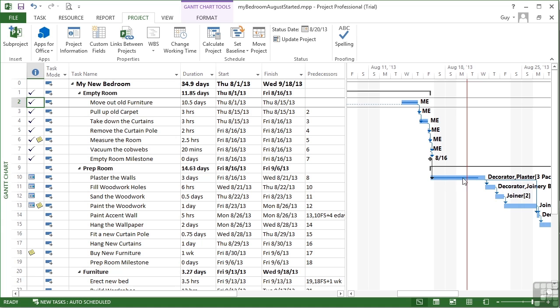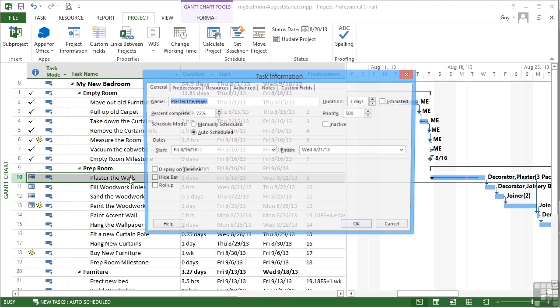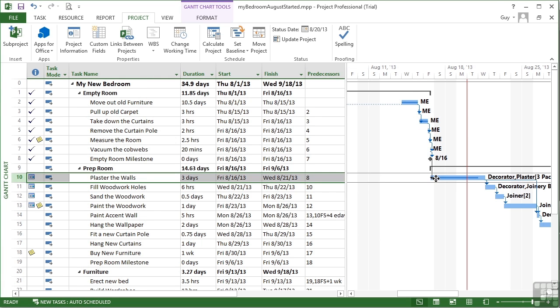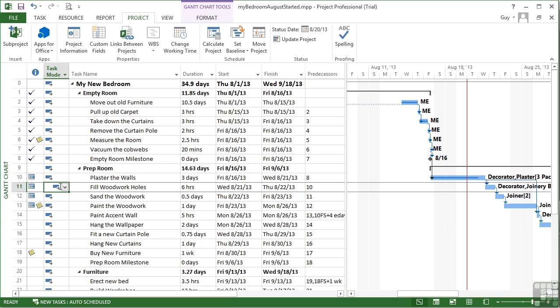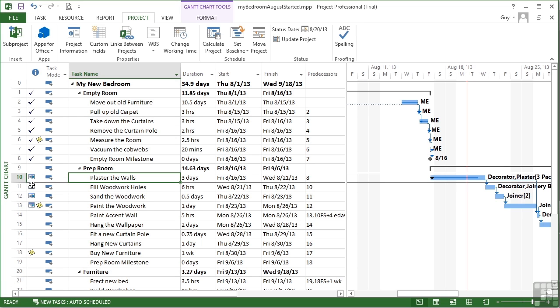Those that cross over the date, such as this task here, plaster the walls, it will have some completion in there. If I double click to look in the task information, 72%. That's what that internal blue bar represents. But we also have some little constraints. If you hover, you'll see that the constraint says this task has a start not earlier than constraint. That constraint was created when we pushed forward the tasks to say that task cannot start before the push forward, so that was the push forward to date 8.13. But then the fact that it's linked to predecessors causes the actual start date to be much later than that. So we've got 8.16, 8.21, 8.22, 8.23. But that constraint was added by the update project pushing the tasks forward.